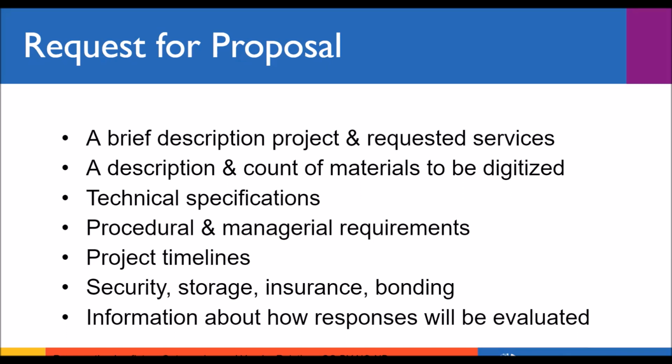You'll also want to include any sort of procedural requirements that you have. So especially with archival or cultural heritage material, you'll probably have some handling requirements, like no food or drink around the material, possibly wearing gloves for certain material, that sort of thing. You'll also have, if you have any sort of billing requirements, like you need a vendor to get set up in your system in order to pay them, or if you have 90 days payment or something that might not be quite normal, make sure you put that in there so that you are giving as much information as possible to the vendor.